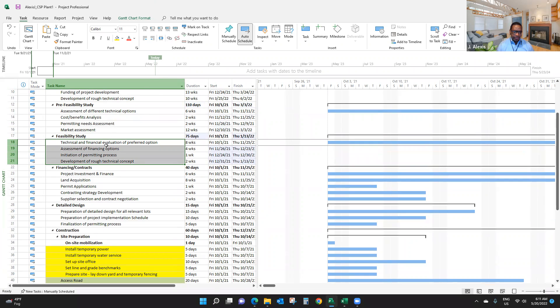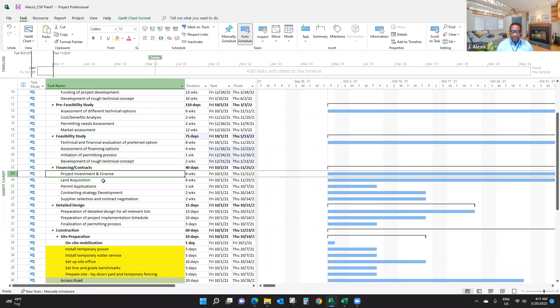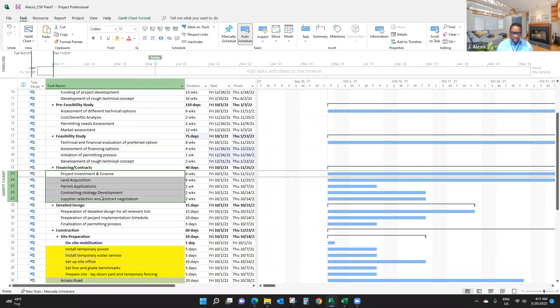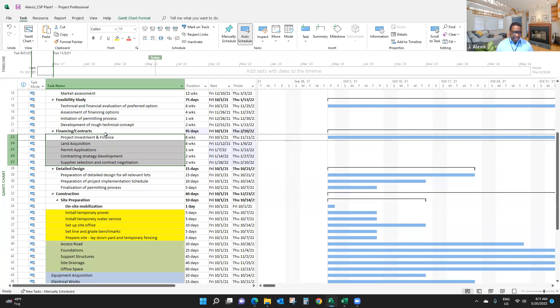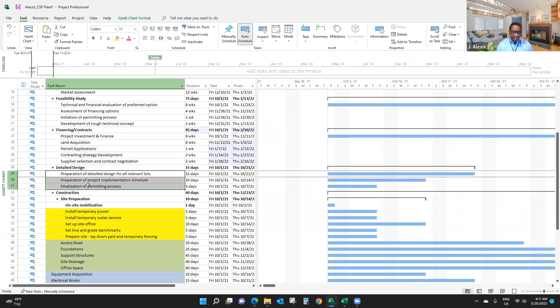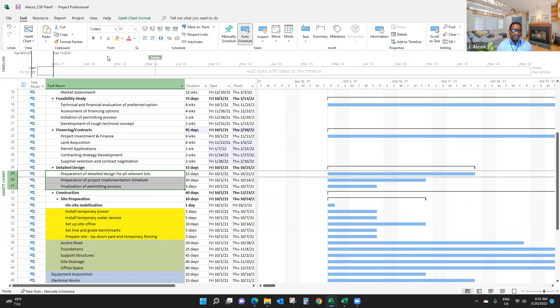In other words, I finish one activity, one deliverable, and then the next. But I may change that later because I don't want to plan everything finish-to-start. I want to plan things start-to-start or finish-to-finish as much as possible to create what we call laddering or fast tracking in my project schedule.